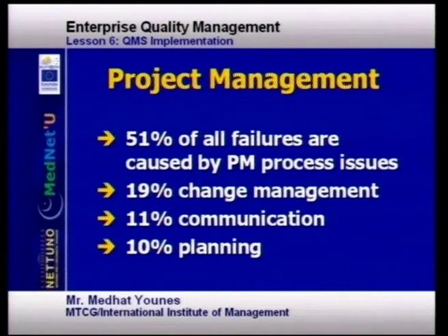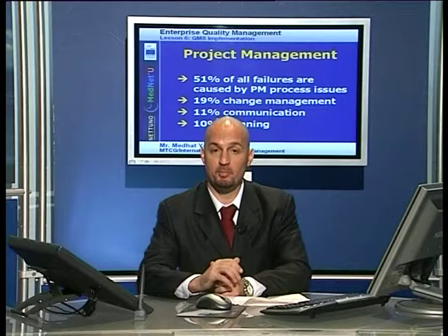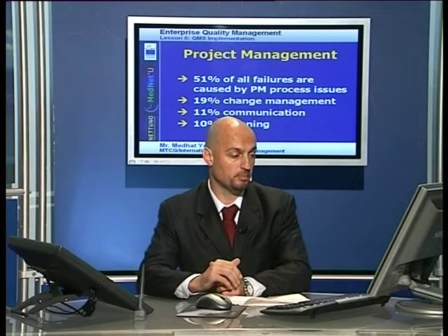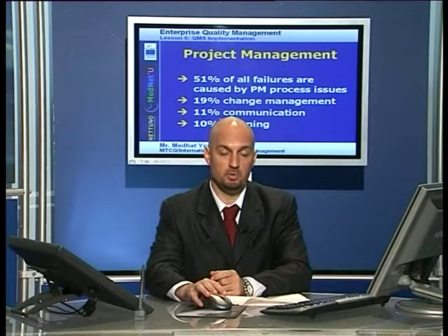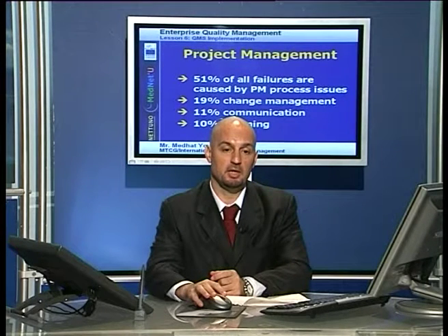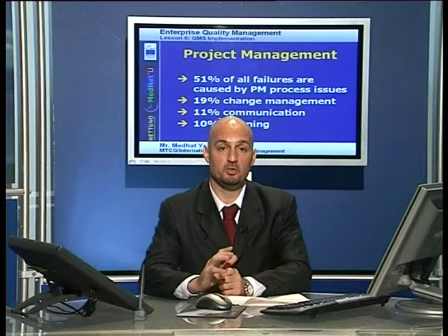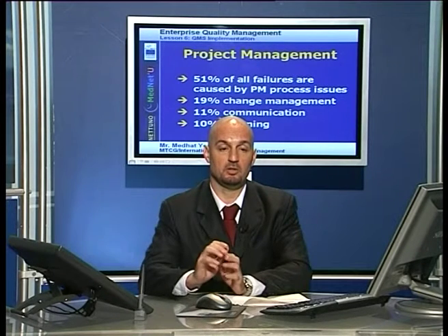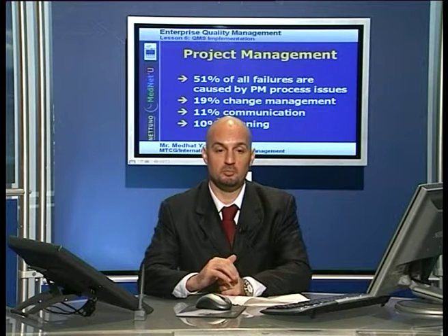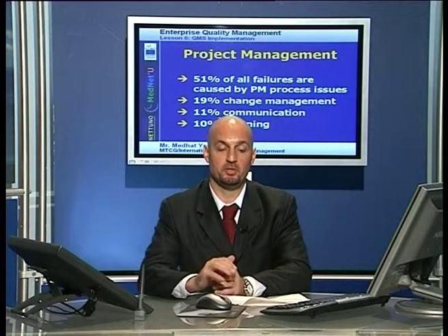51% of all failures are caused by project management process issues. 19% caused by change management, and 11% by communication, and 10% by misplanning or lack of proper planning for the project. This illustrates the importance of having proper quality project management, especially if the project involves enterprise-wide initiative rather than just a simple manufacturing process or a few processes within the organization.